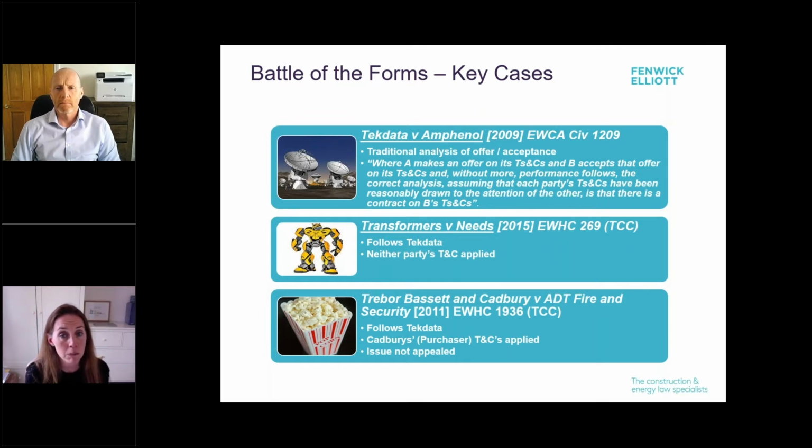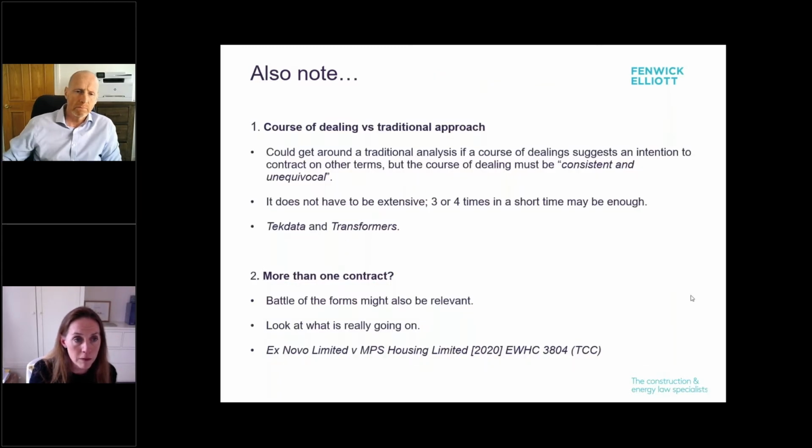So if you want your limits on liability to apply, you need to make very sure that they are included in your contract, and if you're relying on standard T's and C's, you need to draw attention to it by putting it in bold, mentioning it on the front of the document or something along those lines. So just a couple of other points to note before I pass on to Dave.